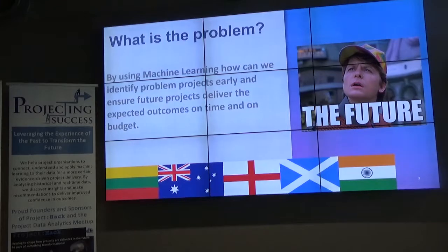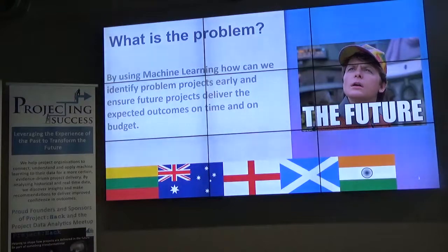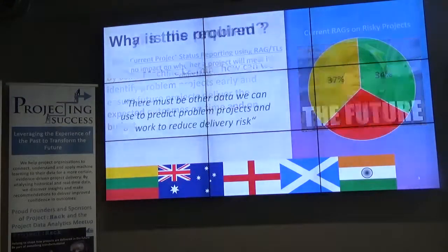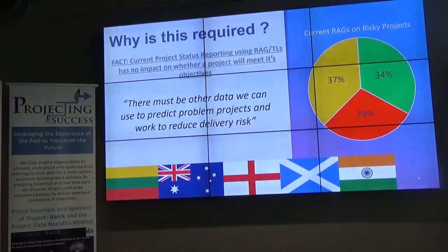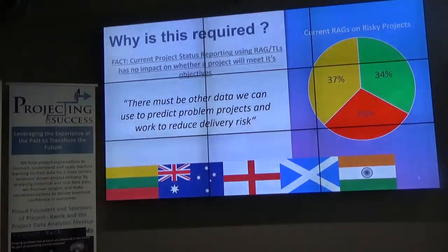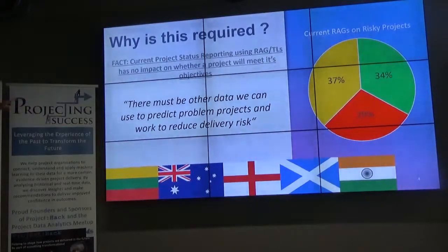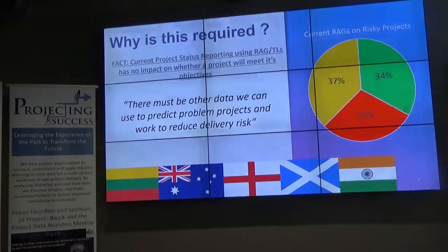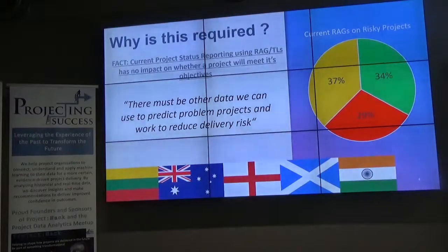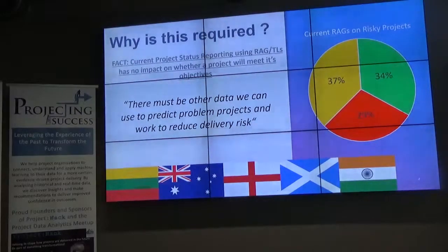So what is our problem? By using machine learning, how can we identify problem projects early and ensure future projects deliver the expected outcomes on time and on budget? We were using Oxford data to make sure we could get that information to actually do machine learning. What we identified through the data is that risky projects — those over budget and over schedule — were reporting 34% of the time green, 37% amber, and 29% red. So project status reporting, which most PMOs love and read all the time, is actually incorrect most of the time. We must be able to find a better way using the data inside project management systems to eliminate delivery risk to the portfolios.